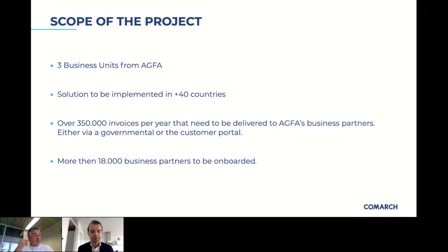First of all, a lesson learned, also for me personally, was that in the beginning we had a very ambitious planning. So we truly believed that in 1, max 2 years time we would be able to get all the countries in Europe on board, and that we were ready for the future. Now a lot of things are happening internally but also externally, which makes you decide to do things differently as we move on. Again, the Steerco is helping us there to get to an agreement in order to make a new planning, which has a better view on the future. The planning is now what we call more short-term rather than long-term.